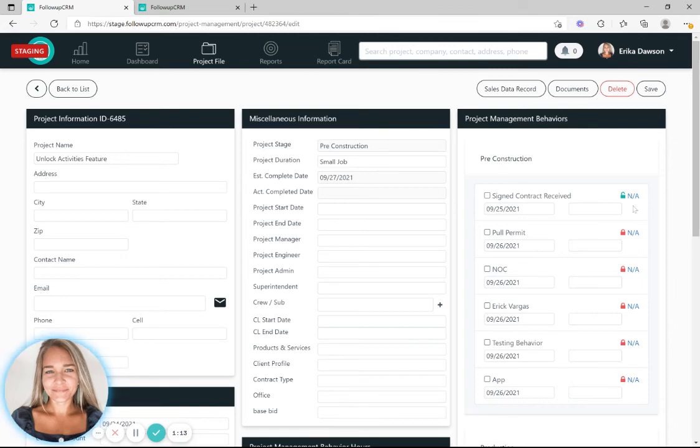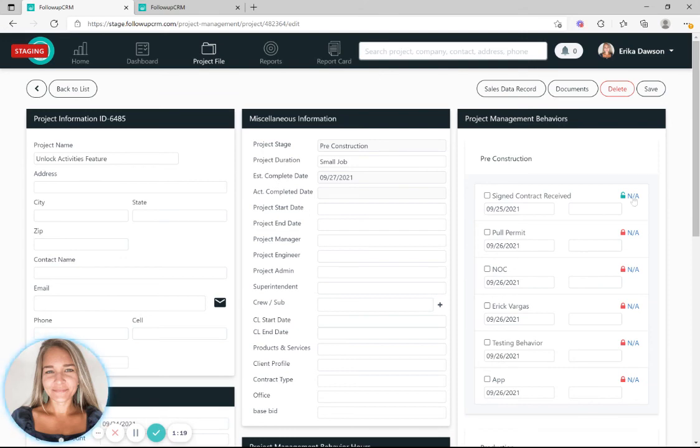You can also skip an activity if it doesn't apply to this specific project by clicking NA. Now this activity won't show up as completed or past due in your dashboard. And that's it.